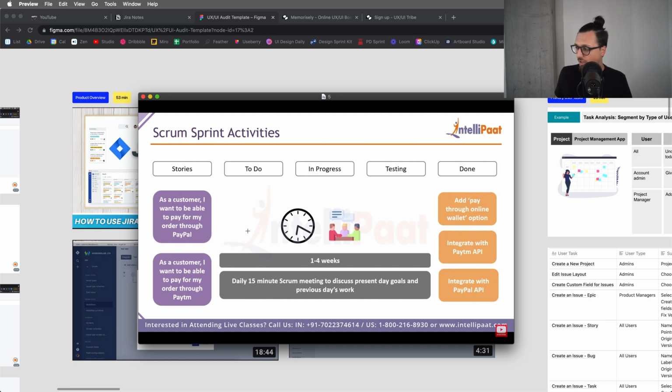This pretty much summarizes it outside of these ceremonies. So ceremonies, one of those being the daily stand-up, second, the grooming, which is where we go through a meeting and talk about all the stories that I've worked on as a designer. Now the engineers are going to point it, which is what I was talking about. So points come in on a Fibonacci scale, is what we use. Half point, 1 point, 2 point, 3 point, 5 point, 8 point is generally what that looks like.